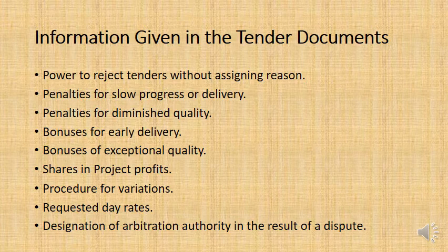An arbitrator is someone who both sides agree will act as a judge and jury if there is a dispute. And it's usually someone within the industry. It will be a third party, so it can't be someone who's on the payroll for the seller or the buyer, the engineer or the contractor. It has to be someone who's not biased, and the two parties will agree, hey, if we have a problem, we agree that this person can arbitrate between us.